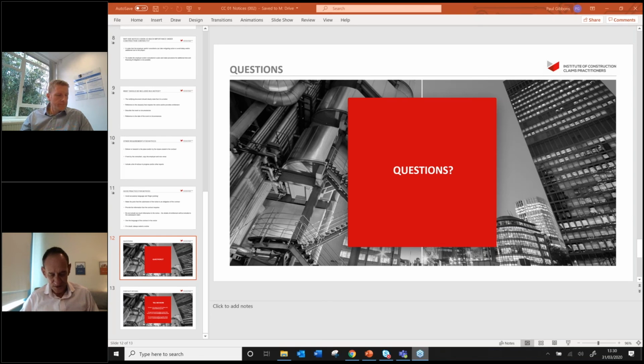Last point, at what point should the engineer consider subclause 8.8 suspension of work? Now, okay, we've got a situation with the virus that the projects could be on lockdown, on delay, for whatever reason, depending on how your country's been affected and how the project's been affected. If we consider it's a force majeure event, well, possibly the contractor might be wanting to claim his costs for prolongation. If it's not a force majeure event, possibly the contractor won't be entitled to claim for costs. So I think the engineer and the employer have got to sit down and think about at what point is it better to instruct the contractor to suspend and possibly pay demobilisation and remobilisation costs. We can't have this going on forever.